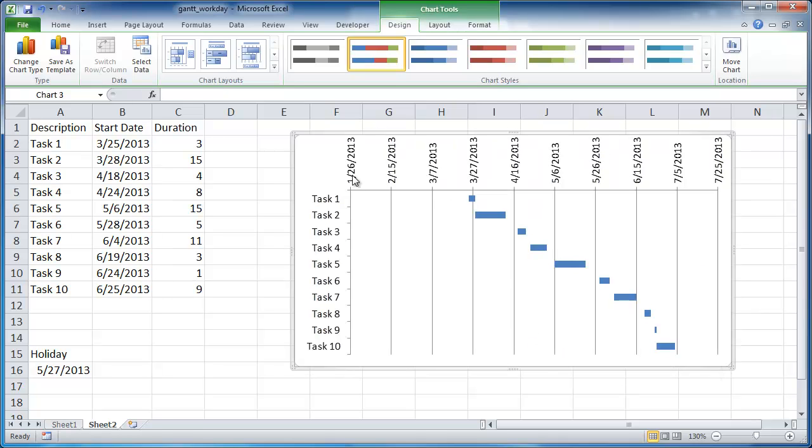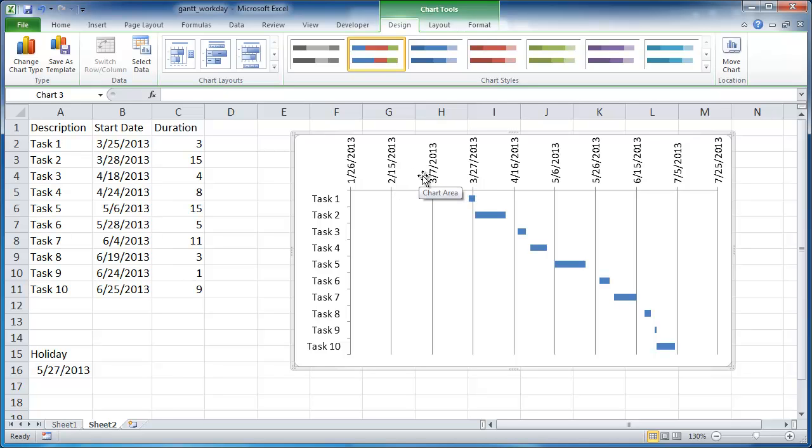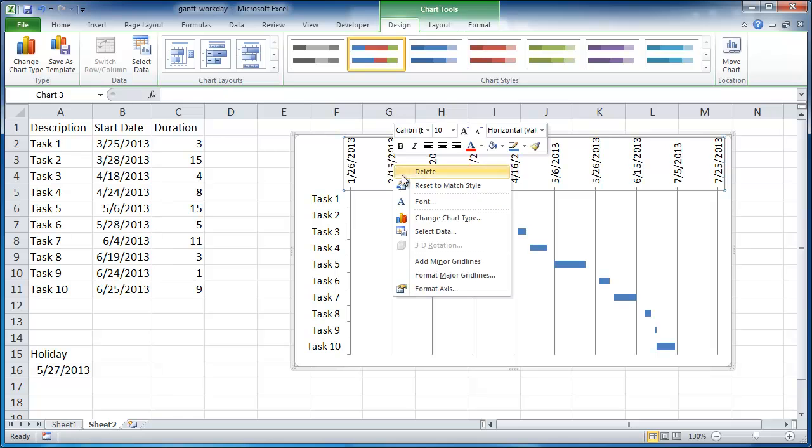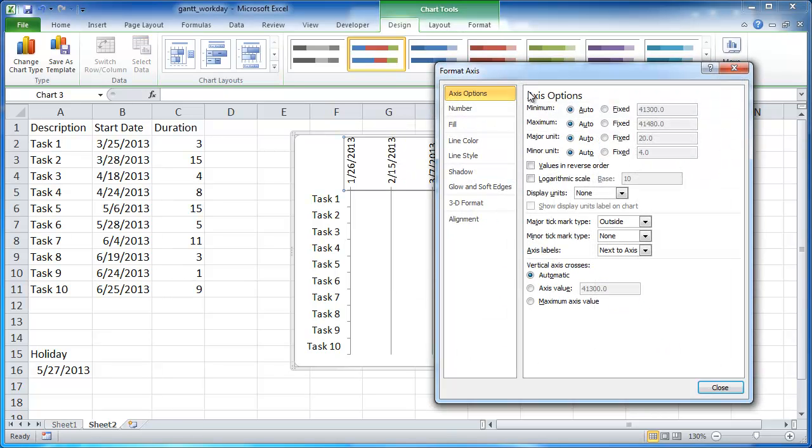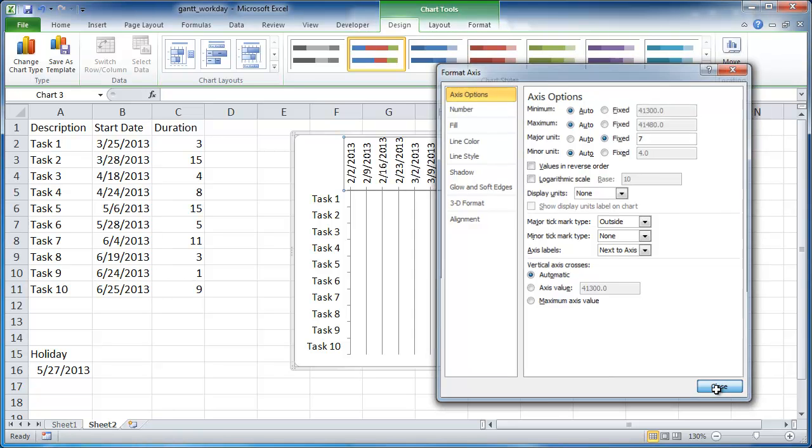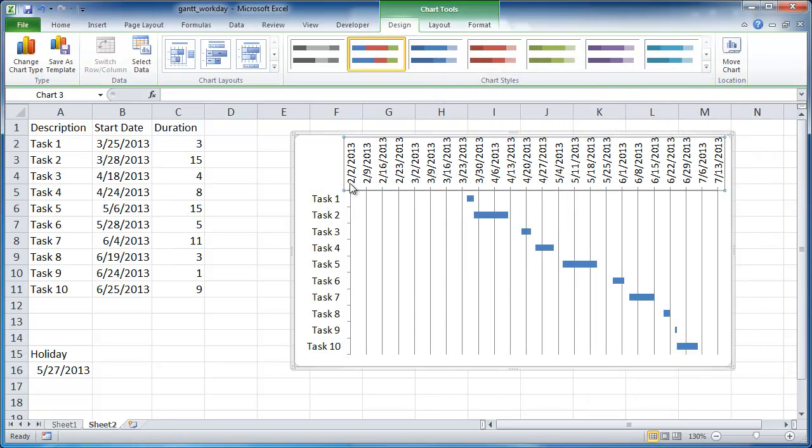Another thing that we want to look at is, let's say that we want to have the chart or the axis values have a gap of seven days. Right now it doesn't. You can see that there's a gap of, let's see, more than seven days, probably about 20 days. What I can do here is select the axis, right-click, go to format access and change the major unit. And it was 20 days, so instead of 20 days make that seven days. So it's going to separate it out seven days.